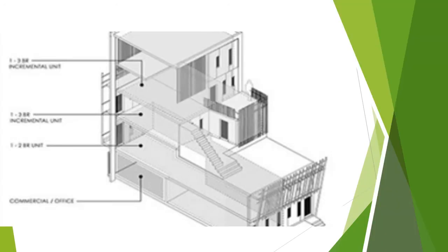As I said, the best example can be a building construction, a residential or office construction project. When we finish the ground floor, we will rent it out for office service. And from the money we get from the rent, we can continue building the first floor, the second floor. These kinds of projects are incremental projects.